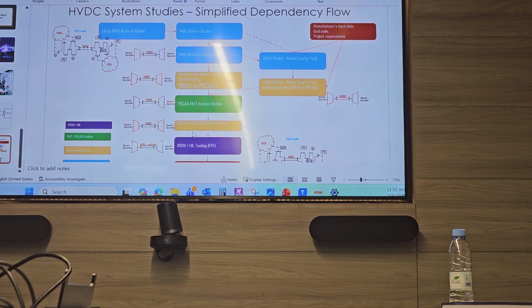With HVDC, you cannot do this. What is tested is fixed; you bring it, and you have this option. You have the option to tune things. I will tell you how you can tune and change things. But for the project, once the test is done, you cannot test again.